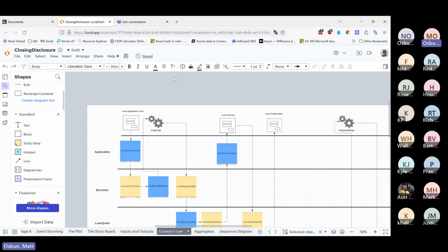I point you to the requirements, saying, does this cover everything? Write your name down. This covers everything. I've talked with you. I've mocked it up. Here is what we're going to build. If it's in here, that's what you're going to get. If it's not in here, it's in your head, you're not going to get it. And that's the way it is.